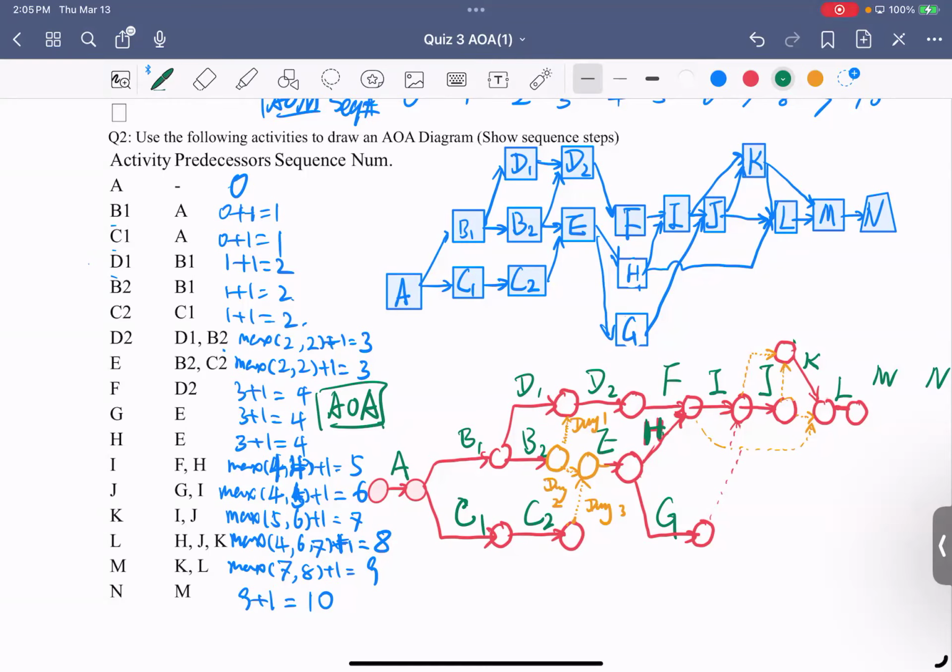I'm asking because you said that the red line was the activity line, and you needed an activity from J to K, but they're all dummy lines from J to K. So is that okay? Yeah, why not remove that box and just put a red arrow? Which one? The one to the right of J. This one? Yeah, why can't we just use that line and put it straight to K? If you do this, your dummy and the J are sharing the same nodes. And if you do this and it's red, the same line can't have the same circle. Okay.